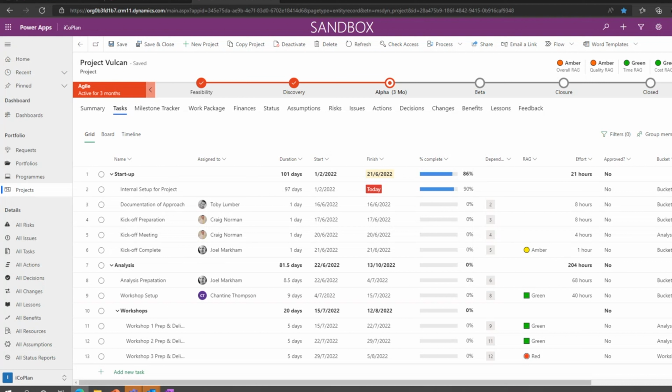One of the other great features that we like to use is the ability to export this into Excel. So I can export all my tasks, and it comes up into an Excel spreadsheet, and I can use that to take the tasks and filter them in a bit more detail if I wanted to. Or in my experience, I've done an export to Excel and done a little pivot table, a kind of tasks by month, and just tried to understand the schedule in a bit more detail. So that's a good little feature to use.